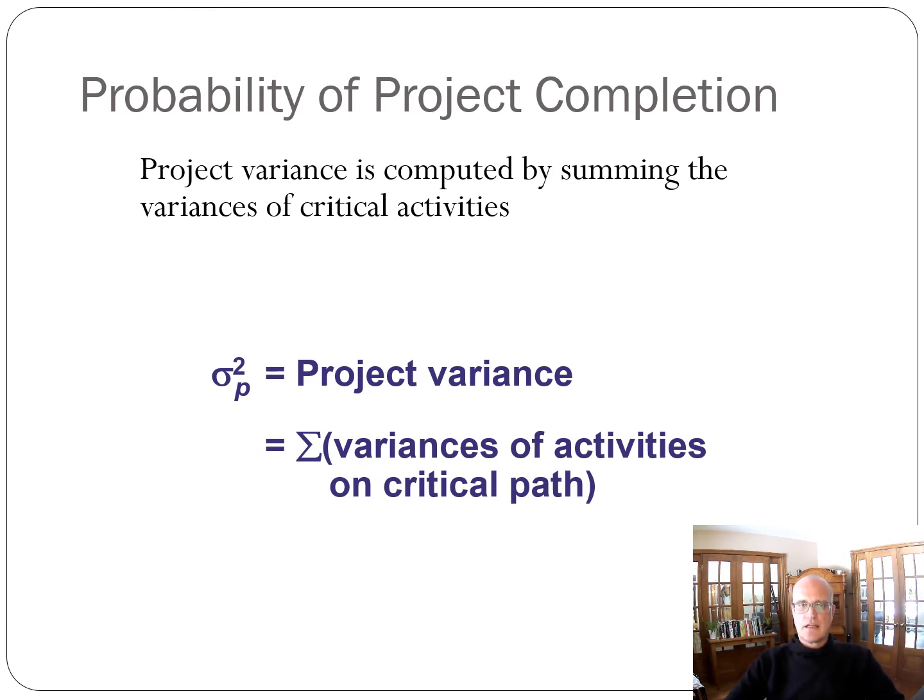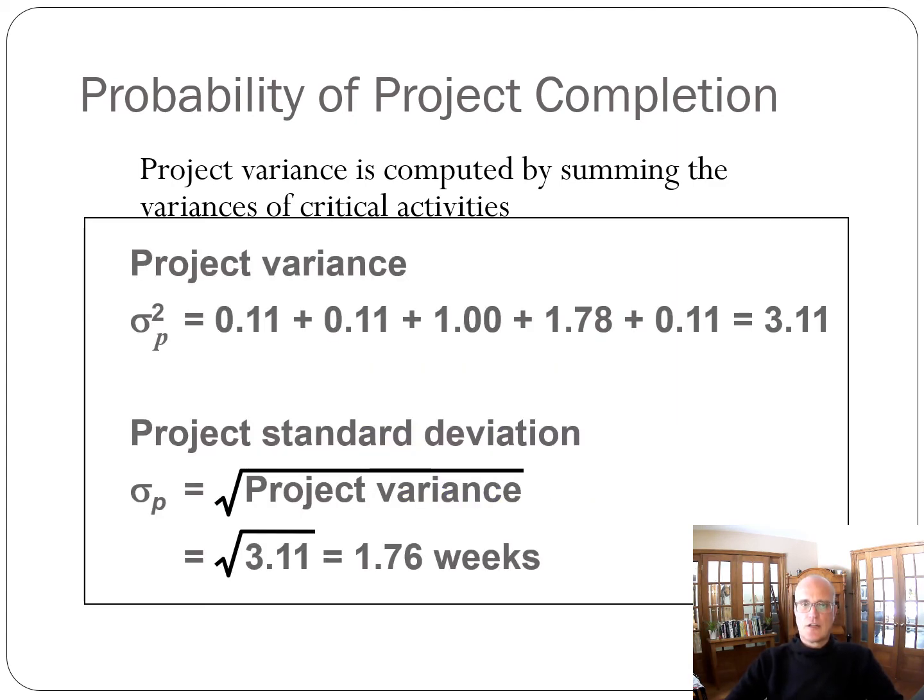And so then, the probability of project completion is the type of question you might get. Project variance is computed by summing the variances of critical activities. In this case, we've got 0.11 plus 0.11 plus 1 plus 1.78 plus 0.11. This is a project, we haven't seen it here, but this is the critical path. We just sum them up, and then the project variance in this case is 3.11. And the project standard deviation, which we will need for our calculations later, is just the square root of the variance, is 1.76.